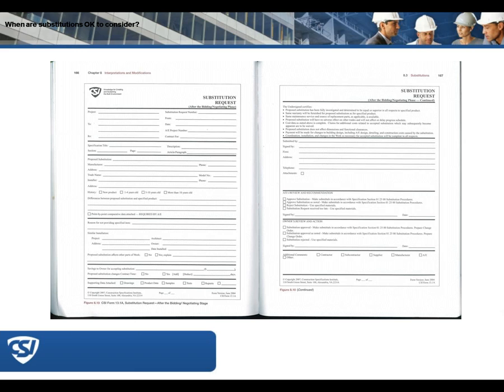If there's any detailing requirements, that will be taken care of, and if there is cost to the contractor for this substitution, that they will take care of those costs as well. And finally, all the coordination, installation, and other changes in the work that are necessary will be completed to the satisfaction of the project in all respects.